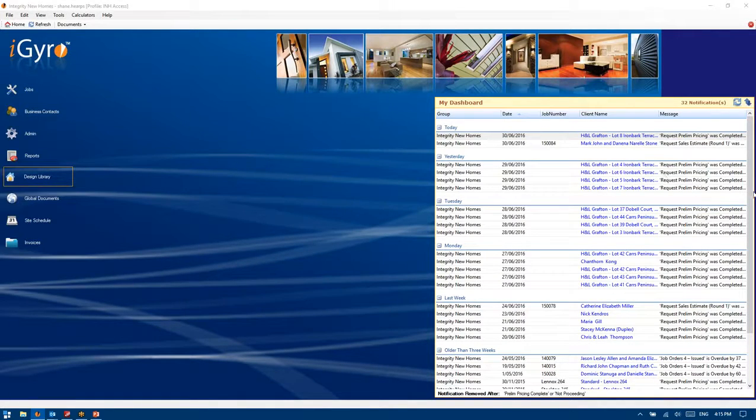Obviously, there's going to be instances where you need to provide a price for each of your homes. It's a reasonable expectation that if you have a house design you should be able to provide a price to a client for it. But definitely where there's substantial changes requested or where they're turning up with their own owner-supplied plans, if that's the market that you're in, I don't think it's unreasonable that you should be able to charge for your time. And if $300 doesn't sound like enough for the amount of time you need to invest, you as an independent business can adjust that preliminary services agreement field to reflect what your time's actually worth. If you think $1,000 is more applicable to the project, especially if it's a big multi, then charge accordingly.